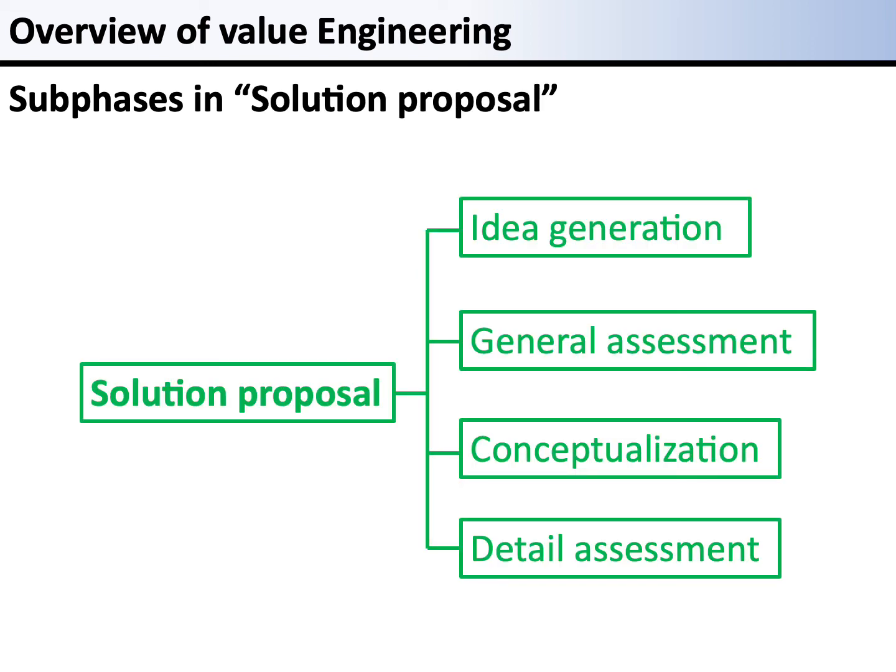The phase of solution proposal is composed of idea generation, general assessment, conceptualization, and detailed assessment. Through these phases, we develop a new solution proposal for the VE target.